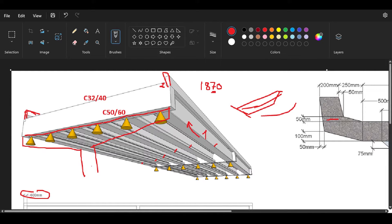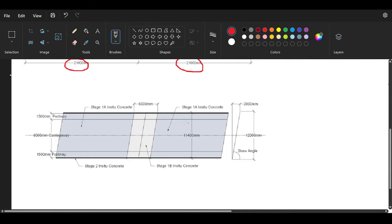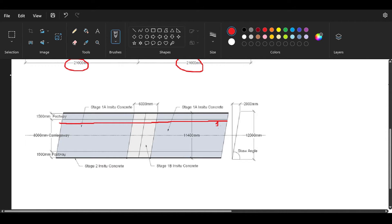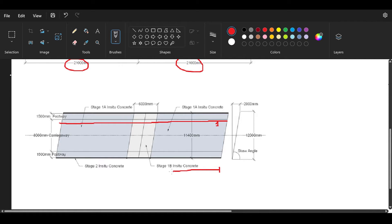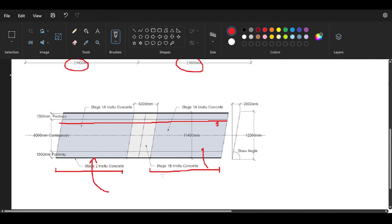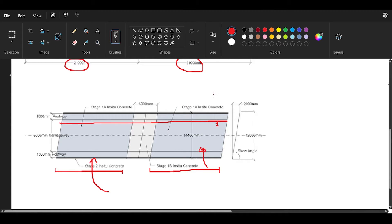For the construction sequence, the first step is to basically put the beams on the supports—that's stage number one—and make sure they can carry their own weight. So stage one is the beams. The first thing that will happen here is the beams.